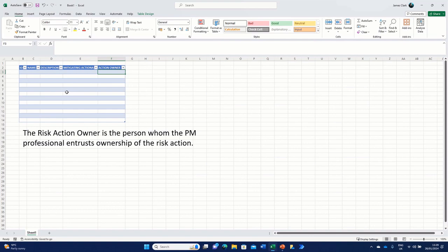But what we can also do is expand this to get some scores, in terms of what it actually means in terms of cost to the project, and what it actually means in terms of a time impact to the project. These things are important when setting out in a project to determine how much budget to allocate to risk and how much time should be allocated to the schedule to allow for any unexpected overruns. So let's put these in as their basic elements.